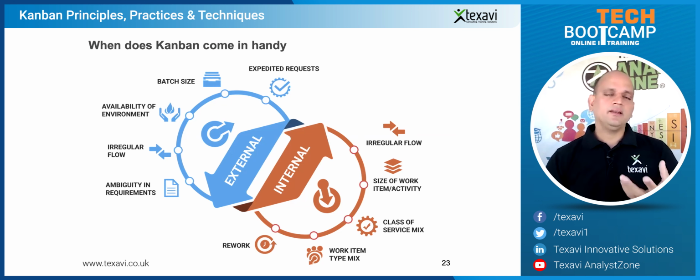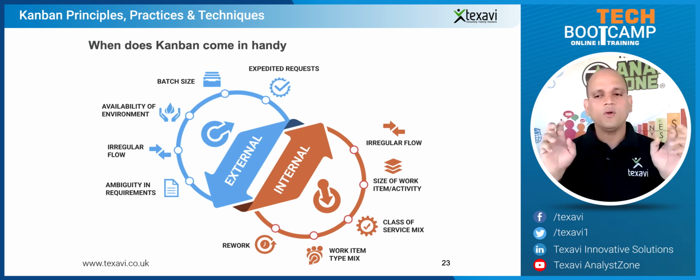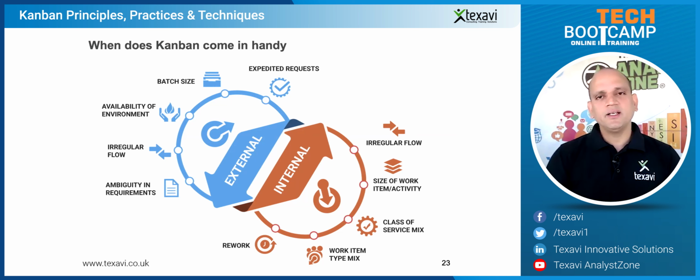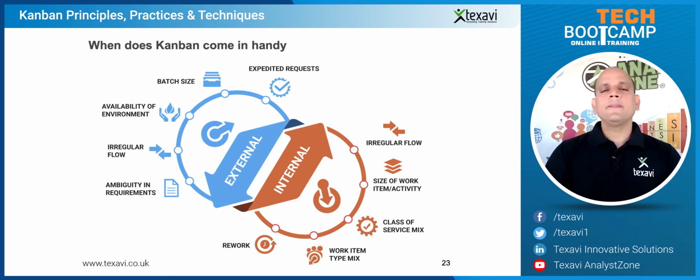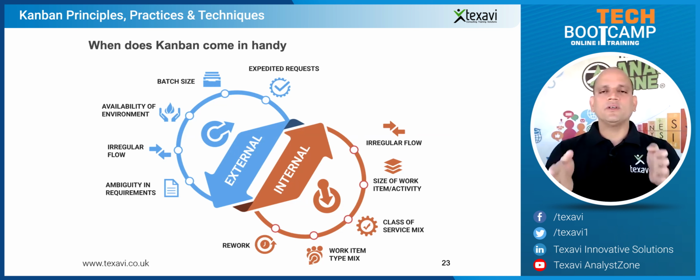And that's why it doesn't really work on its own merit, but it fits in beautifully with Scrum, because in Scrum we have what we call story points. We estimate the work in the context of its size within story points. So we can do 80 story points within this time box, or within the sprint of 3 weeks. That's our capacity.